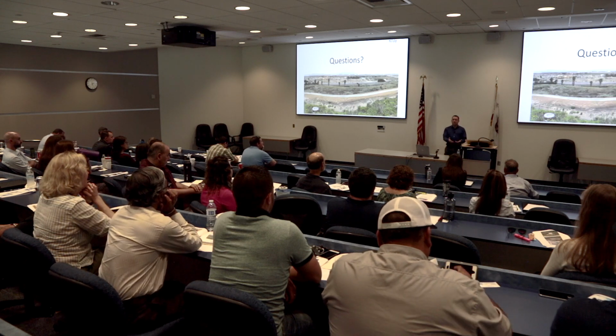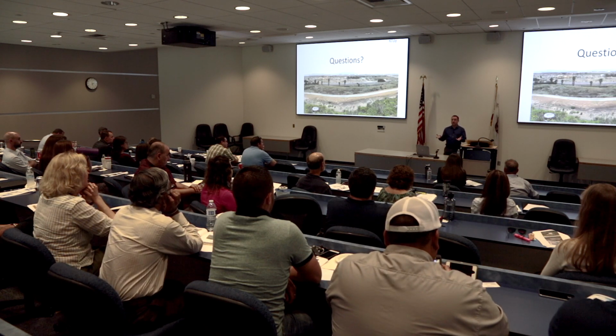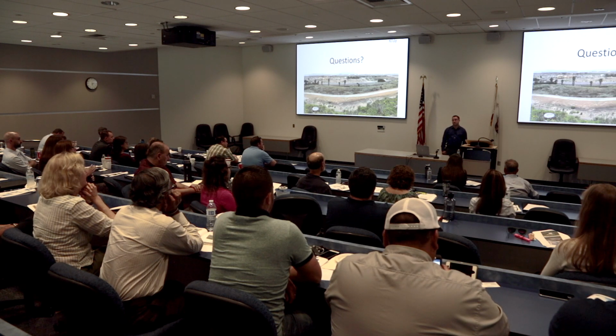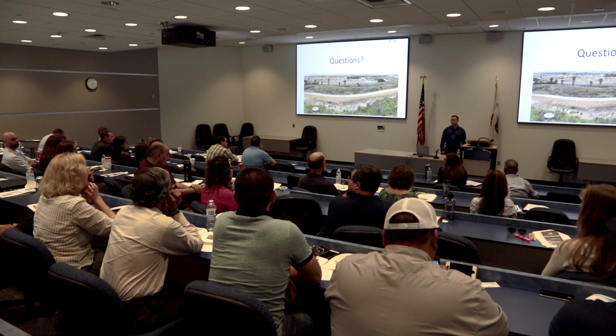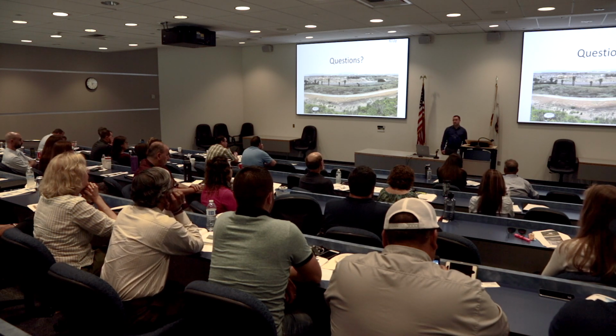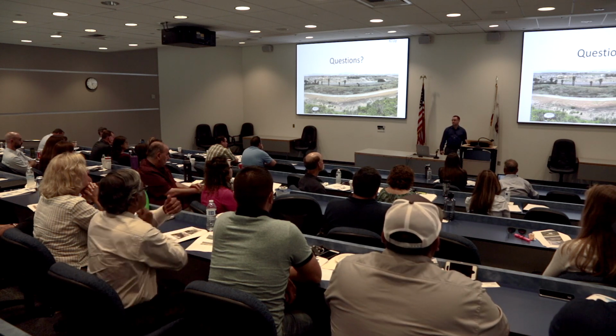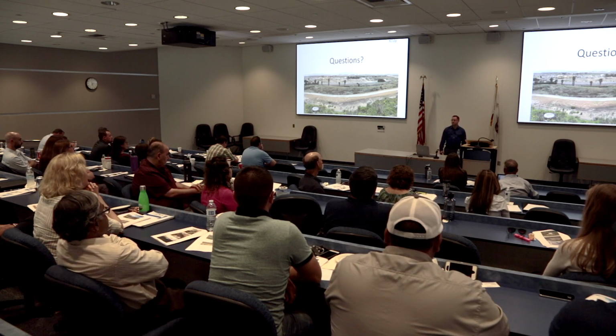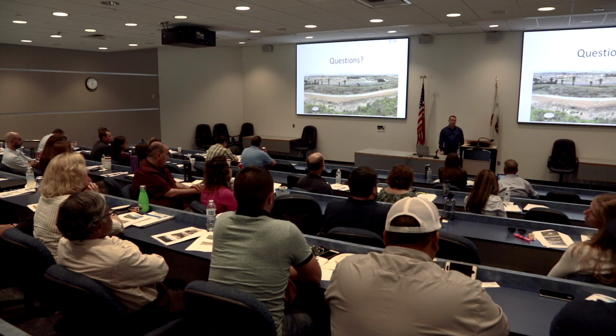And lo and behold, they actually graded the site, they compacted it, and then they did new perk tests, and they didn't get anywhere near the same perk rates. But yeah, they were still sufficient. It just wasn't like 80 inches per hour. I think it was somewhere like 15, 16.